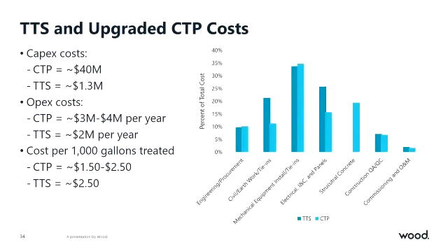The breakout in cost for the Capex is pretty similar. You can see in this plot here. Although we had, again, more on the civil side for the TTS, given all the tie-ins. We had a bit more on the instrumentation, INC, and electrical, given we did bring out a PLC and had all the integration associated with that. And then, of course, no concrete for the TTS, so we didn't have that concrete piece.